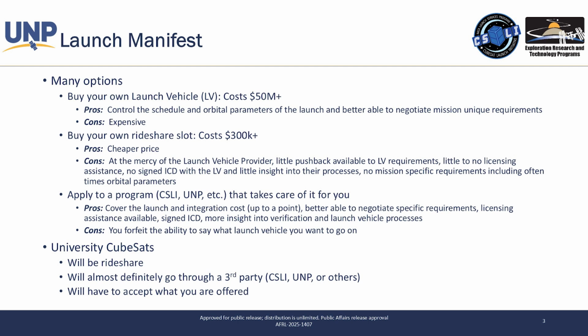That's an interface control document, meaning that if the launch vehicle is trying to impose a requirement on you that will not meet your requirements in terms of the interface, you can push back on that and say, we're not going to go on this, we're not going to accept that requirement.